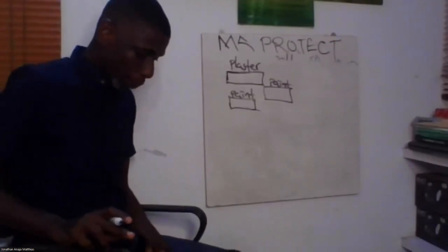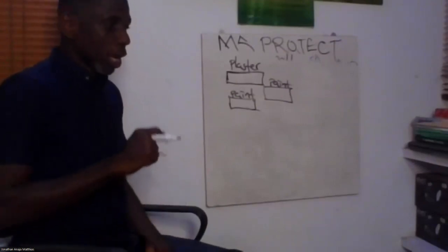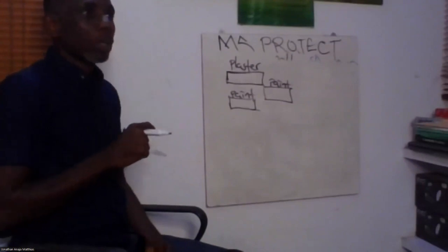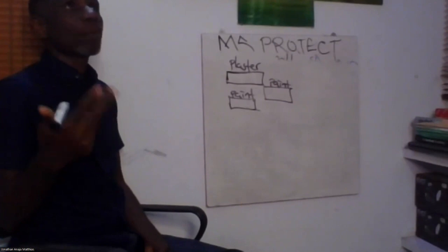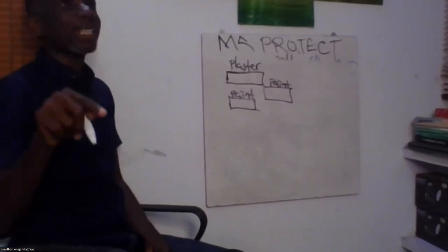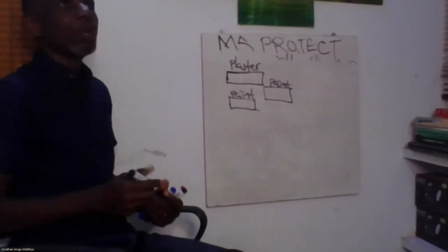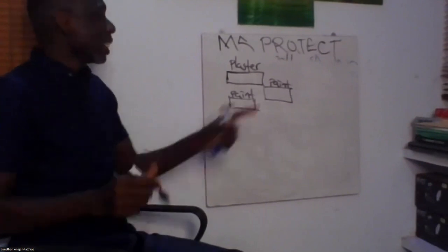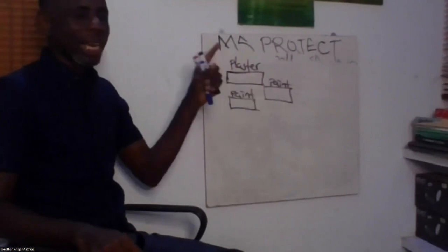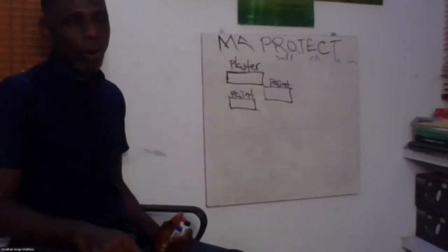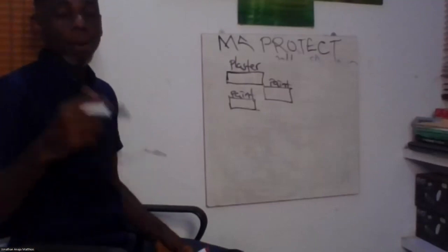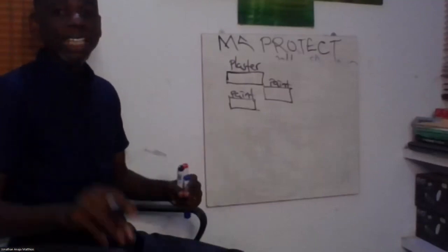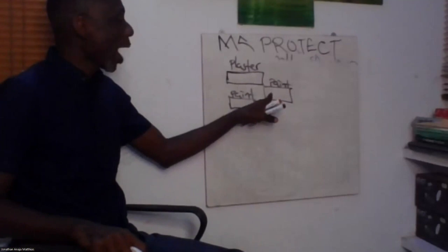Now, if you want to schedule this project now, because you're a professional, if you don't work on weekends, Saturday and Sunday, you will look at your project. Is plastering ending on a Friday or Saturday, and the following day is maybe no work or it's a public holiday? If it is true, you do not need to add a lag.